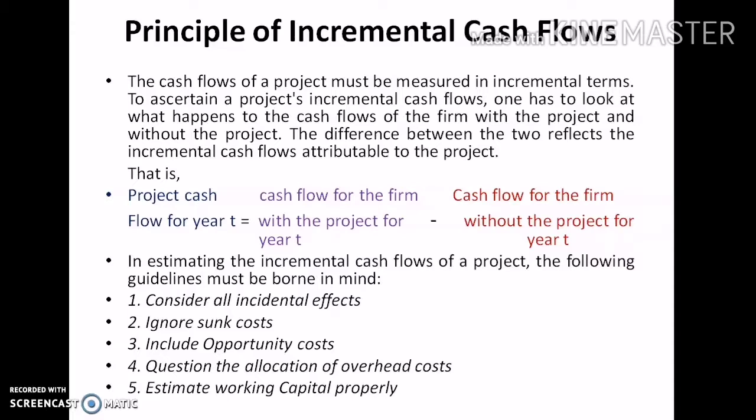Let us move on to the next principle, which highlights the importance of the project, whether that project is adding any incremental cash flows, whether cash outflow or inflow, to the firm. That is analyzed with the help of this principle. The cash flows of the project must be measured in incremental terms. To ascertain a project's incremental cash flow, one has to look at what happens to the cash flow of the firm with the project and without the project. That means this principle highlights whether that project is beneficial to the firm or not. The difference between the two reflects the incremental cash flows attributed to the project.